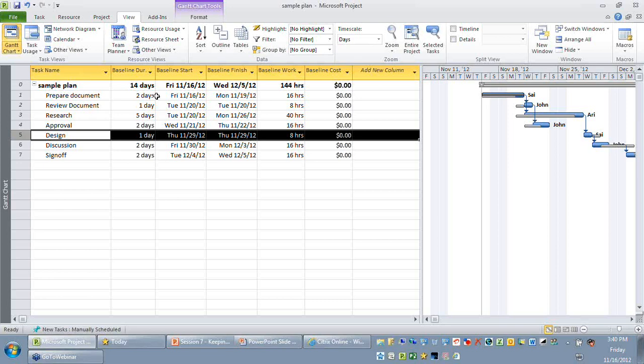The second problem is you don't have any traceability now. Let's say after a few months down the line, the customer is asking you, or you might want to look at, hey, we had an activity like this, but that activity is now missing. We don't know what estimates we had at the beginning of the project. Naturally, those kinds of questions cannot be answered now because you have done a hard delete. It's very difficult to recover that task now.